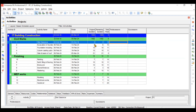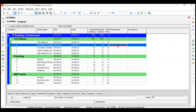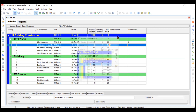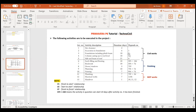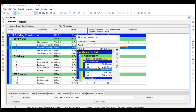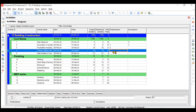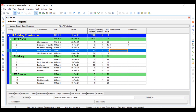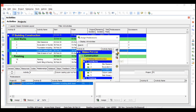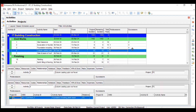I will be showing you both methods. For the second activity, we have a predecessor which is your first activity. Click on it, choose the first activity, and click assign. It will automatically assign the second as its successor. Similarly, for the third activity, we have a predecessor which is your second activity — go to the third activity and assign a predecessor of the second activity. For the fourth activity, we have a predecessor which is the third activity. Now we'll do it through the detailed tab — assign the predecessor as the third activity, click assign.